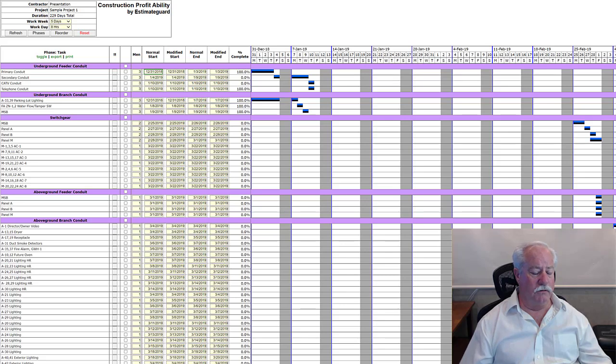This course is for Foreman, and all of that should be taken care of before you get on site. But if you are looped in and tracking that portion of the work, the permitting, the engineering, the contract, budgeting, things like that, you'll probably want to create a phase of construction, label it pre-construction, and put your things in there like shopping out your job site trailer if you're going to have one, connexes, just anything that needs to happen before your project begins and your crew gets on site.